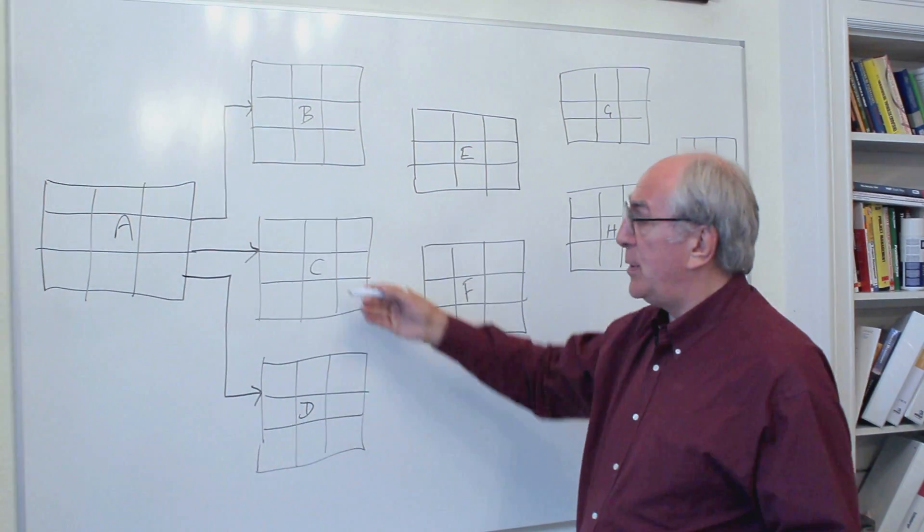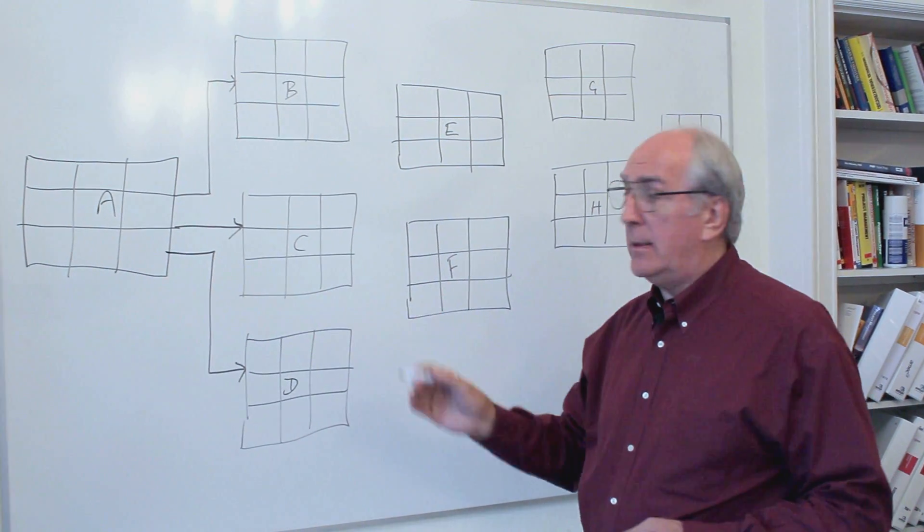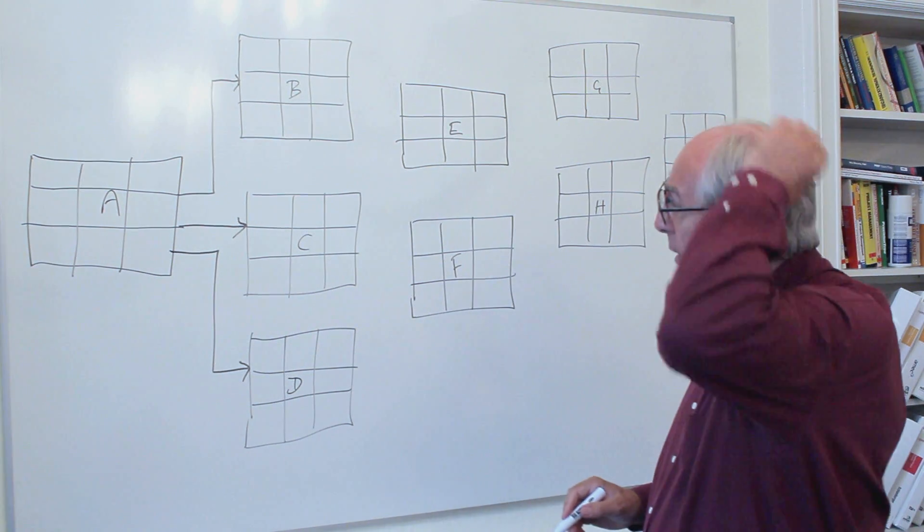And D cannot start until A is completed. Now, there's no relationship between B, C, and D. There's just a relationship between A and B, A and C, and A and D. That's how that works.